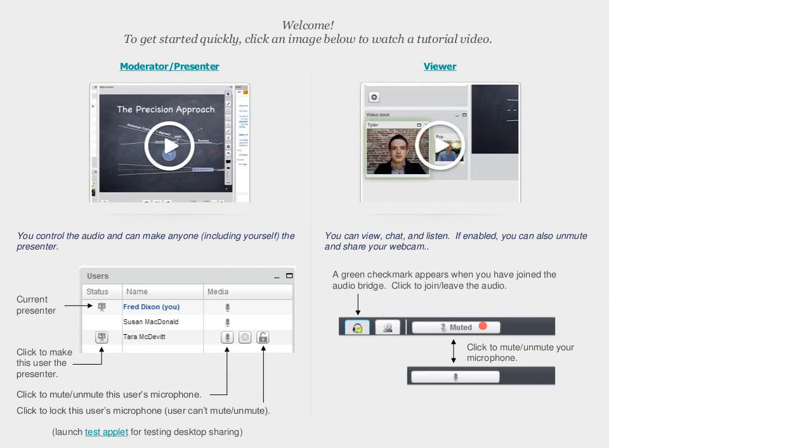We're thinking it's going to need another month's worth of work or so, a month and a half. Let me see other major things. Roughly, we're thinking that during the Open Apereo conference, we'll still be working on figuring out what goes into Sakai 11. So there's still room to find other opportunities for things that could get into Sakai 11. We're going to try and identify scope, kind of nail down scope around that time. And probably the fourth quarter of this year is when we're thinking Sakai 11 would be released.